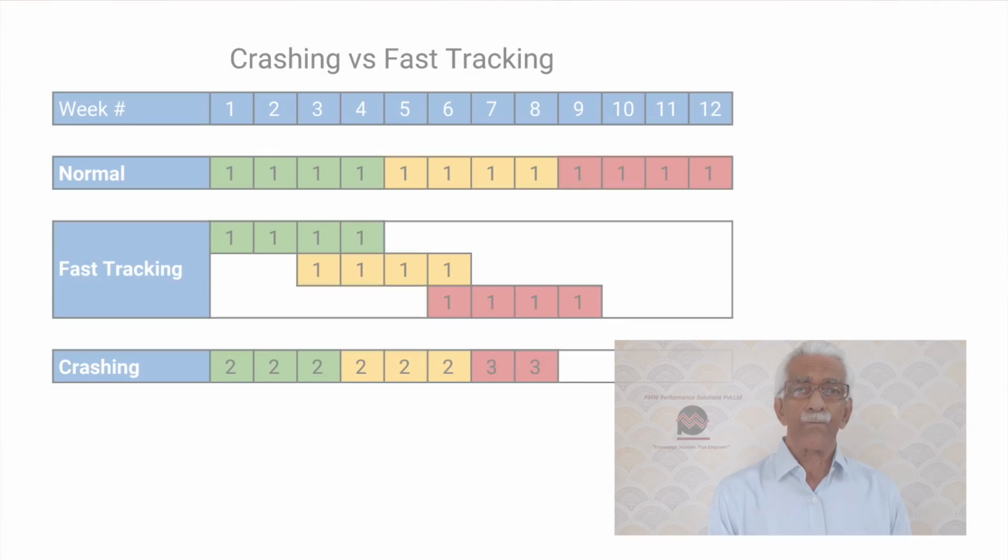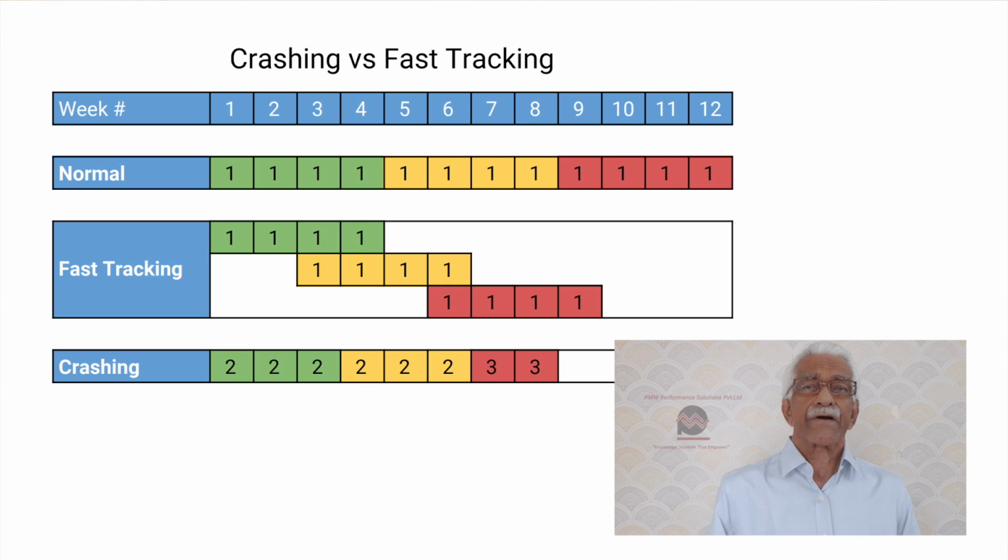The other factor to look into is schedule compression. Now, schedule compression is trying to reduce the time of the schedule on occasions when it's necessary. And you have two ways by which you can do that. One is crashing, where you increase the resources, which increases the cost. And the other is having more parallel activities. Now, when you have more parallel activities, there's a possibility that it can derail. So there's more risk. So these are some of the important things in scheduling.